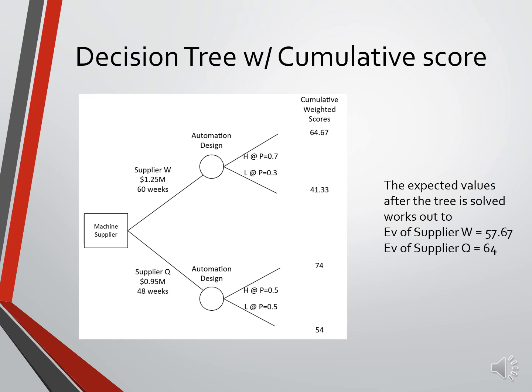The higher scores of supplier Q look to be traceable back to the cost and support availability. The team then agreed that with this higher score and the much higher support availability, supplier Q might be the right choice, knowing that there is support for startup very close, and they are willing to help us succeed in our project goals.